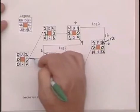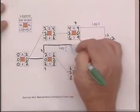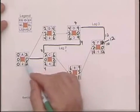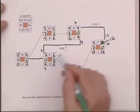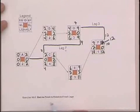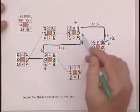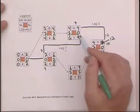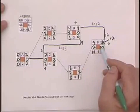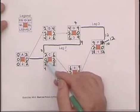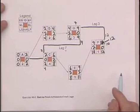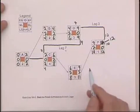So here we have a situation where the critical path looks like that. And so it's A to the start of C to the completion of D to the finish of F as the activity. And this will often happen when you have these two kinds of lags. You'll have one in both cases. In these cases, it's the finish times that are on the critical path. Or in this case, it's the start, but not both. And so this is a little more complicated form of slack and you need to be able to appreciate that.